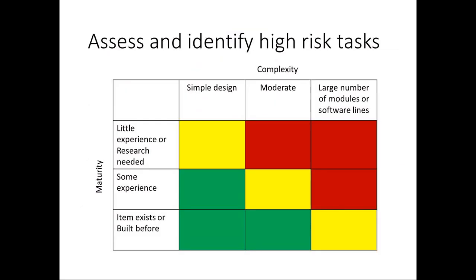An important part of project management is assessing risk. There are multiple types of risk, and the risk of just not completing the project task is an important one. Sometimes we have tasks that are just very complex or ones where we don't have any previous experience. The figure shows that complex tasks where we have little experience have the highest risk associated with them.